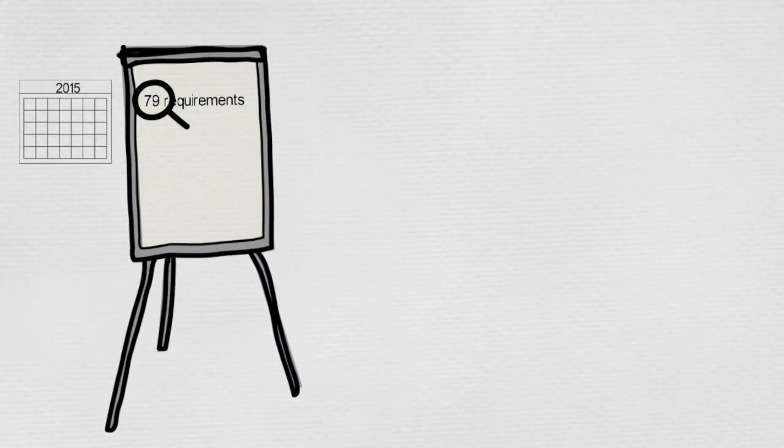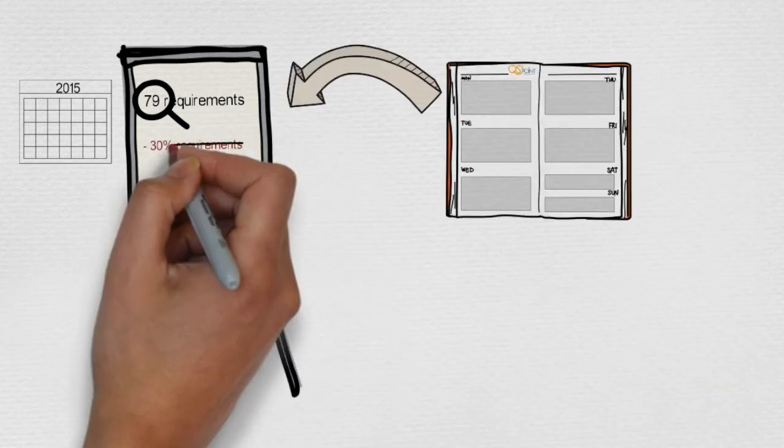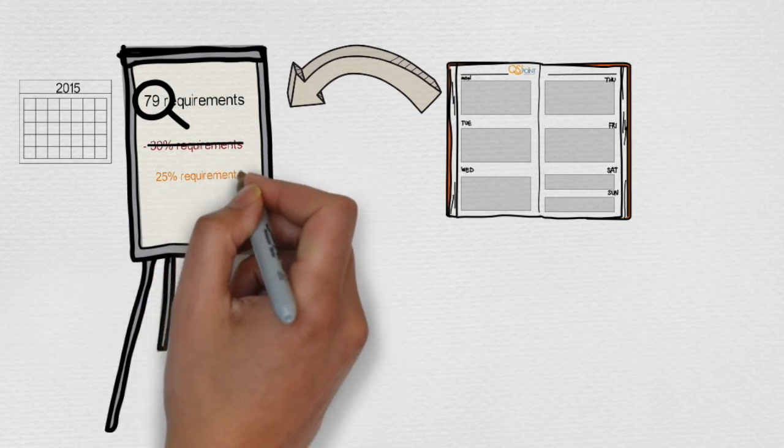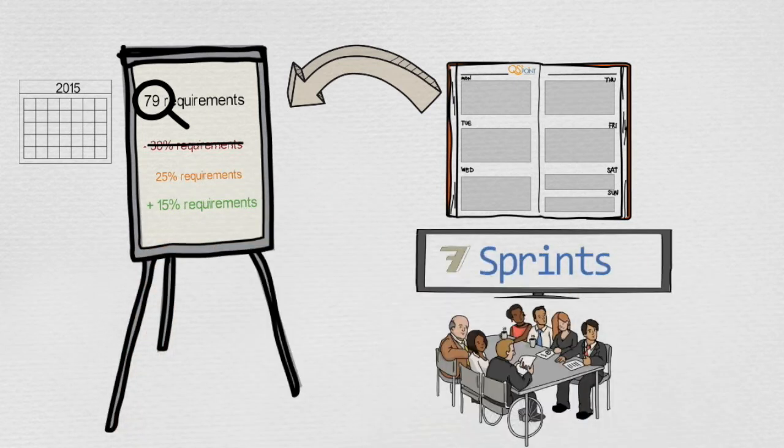In a matter of five business days, we helped John eliminate 30% of unnecessary business requirements, changed 25%, and added 15%. We reorganized the system development into seven sprints, with an additional sprint due to lack of information.